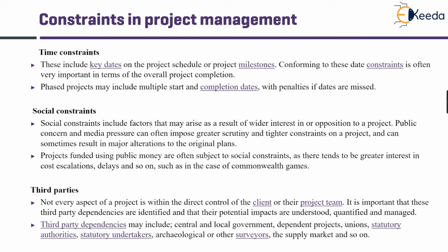include factors that may arise as a result of wider interest in or opposition to a particular project. Usually, projects which are funded using public money are subjected to social constraints. For example, metro projects, Commonwealth Games Stadium, etc.